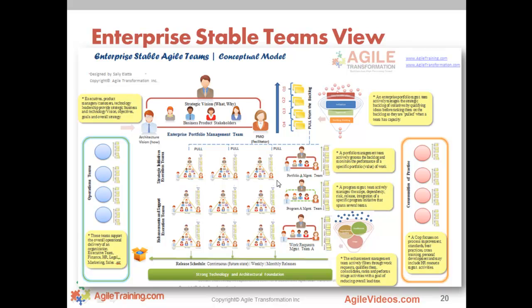Some organizations, some of our more mature clients, are now moving towards having and designing strategic teams that only work on strategic projects, and they have wonderful stable teams that work on minor enhancements and teams that just work on support. So they've actually separated the teams' work from each other because they realize that any team that also gets support work will constantly be shuffling work and being shifted, because it's always a fire, right? The user's got something broken right now that they need fixed. So that will always take priority over some of the major strategic projects that you're working on.